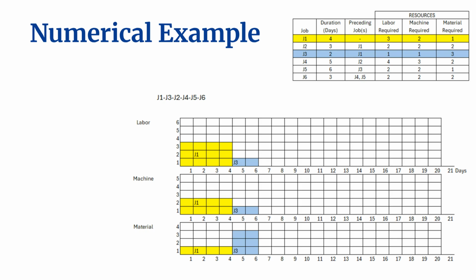Note again the synchronization. Despite differing resource quantities, the start time, finish time, and duration remain perfectly aligned across all 3 schedules. This ensures J3 executes continuously without interruption, satisfying both its precedence dependency on J1 and the multi-resource feasibility requirement. With J3 now placed, we continue building the schedule according to our predefined sequence.